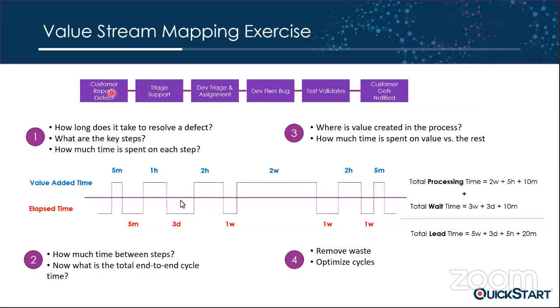When we have a network, we could have another node here, another node here, and this node could have 2 or 3 predecessors, right? The value stream mapping usually is a linear flow. So the nodes are each process, and the lines in the network are the wait time or the lapsed time. So for that reason, we are representing on the top here the time for nodes or processes. And on the bottom, we are representing the time of the lines, which are usually the process within.